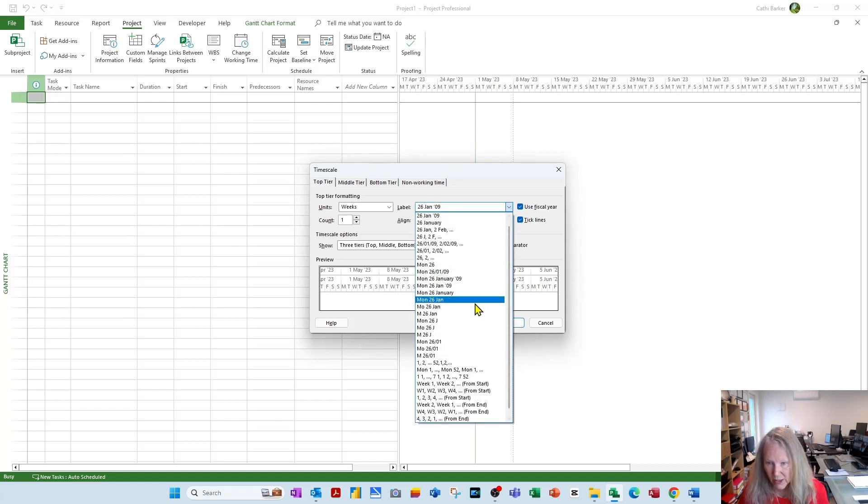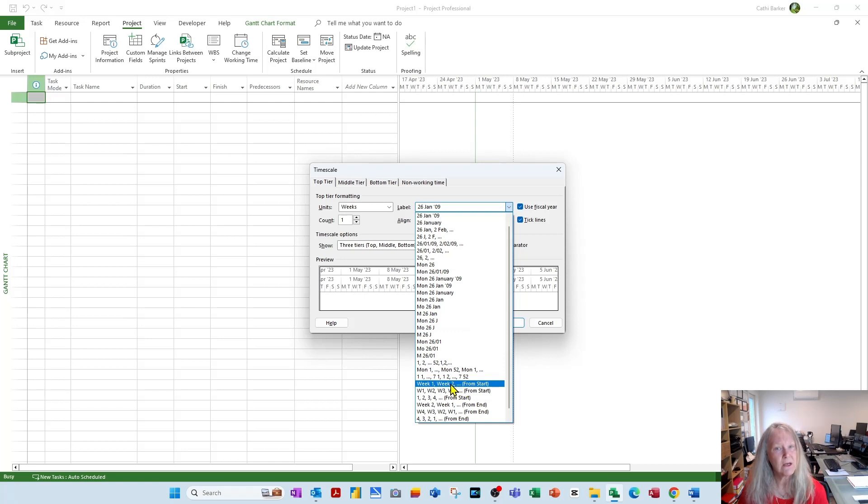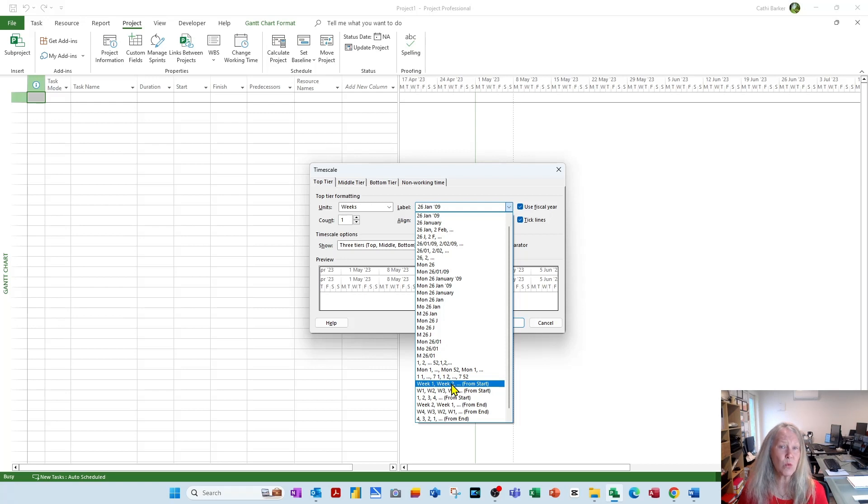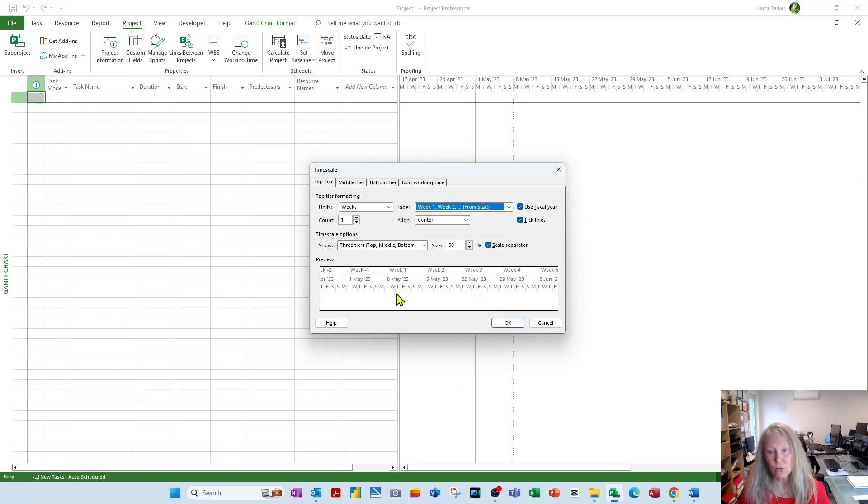I want to see in my label week one, week two from start, this option here. So you have a variety of ways that you can customize your time scale, and this is one of my favorites. Week one, week two, week three, week four is in my top tier.